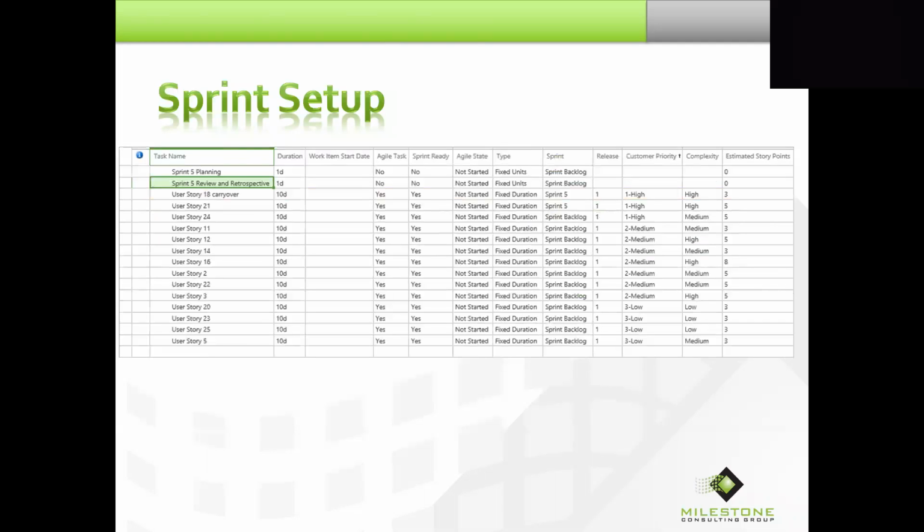If I were just to add them at the bottom of the backlog list, then as we saw, Project Server would put them at the end of the task list on the task summary view in PWA. And I really don't want that. I'd like to have them under that Agile development section underneath the placeholder task. PWA and Project Professional, neither one will let you insert into a grouped view. You have to ungroup it, and then you can do an insert.